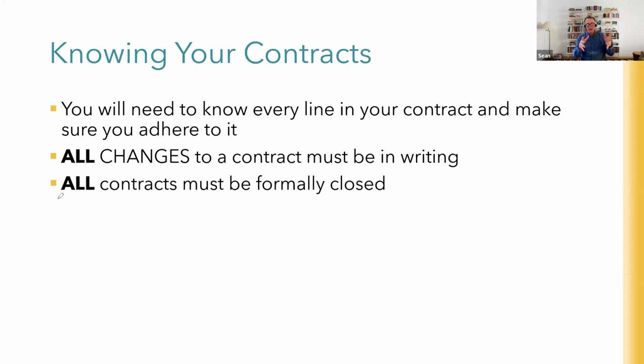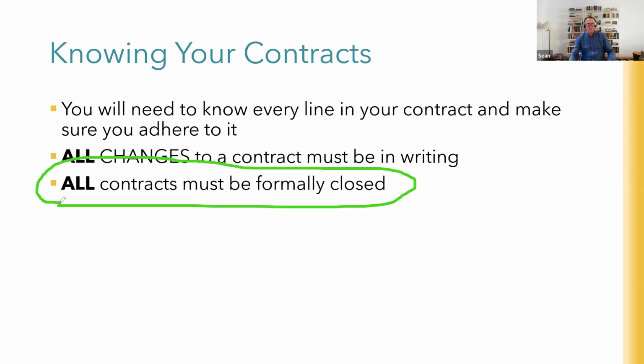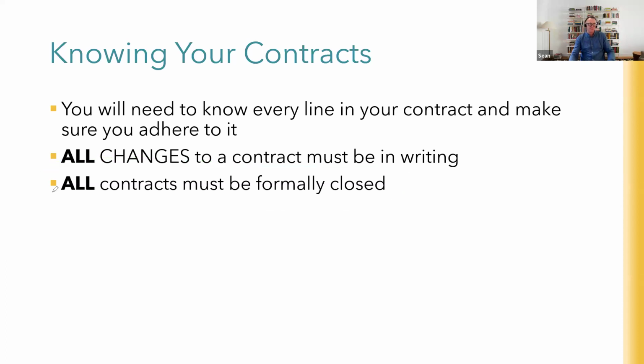Just send each other an email saying so, and it may require a bit of negotiation at the end too, to formally close it. You may say, look, you do that, we'll pay you this and we'll just call it quits. That's absolutely fine too. But that nice little formal closure email or letter or exchange of letters, just saying, yep, everything's been paid for, everything's been done, we're all good. Just a nice little record to have for the future.